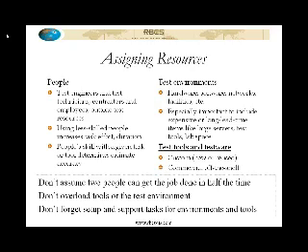Also, you need to ask the question, if nobody on your team is particularly qualified to do a particular task, then how good can that estimate be to begin with? Because the estimate was based on a certain amount of expertise. So if you find you're in that situation, then that's yet another project risk of we really don't know how long this is going to take.